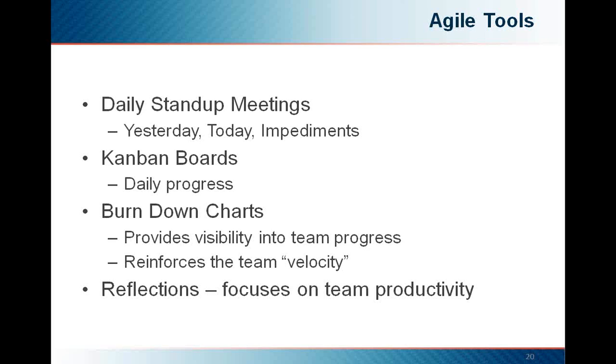Okay, Rick. So can you tell us a little bit more about the tools that you use during a typical Agile project? Sure. We have our daily stand-ups. So the daily stand-ups are really 3 questions we ask the entire team. The entire stand-up meeting takes 15 minutes. It's not intended to be a status meeting. It's more of a task-specific briefing. Once the team becomes real comfortable in this, the daily stand-up is an essential part of the team communications.